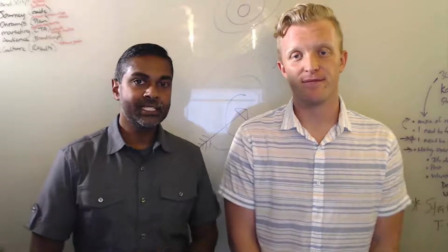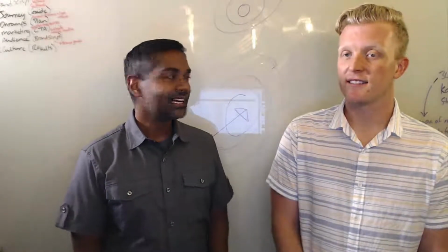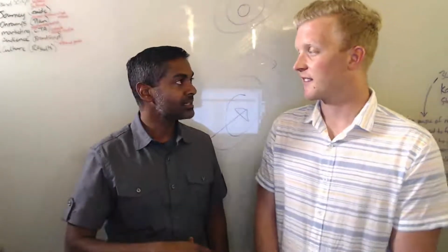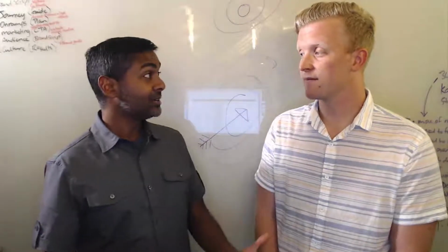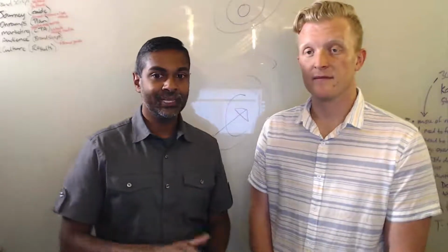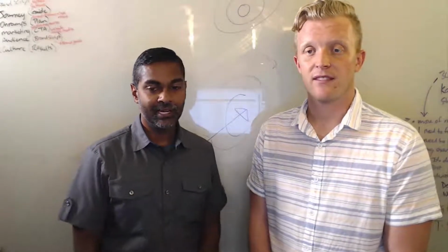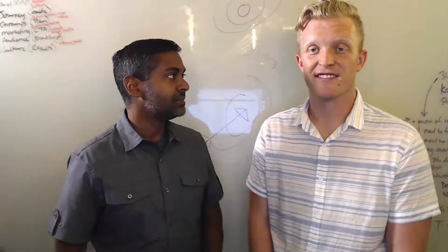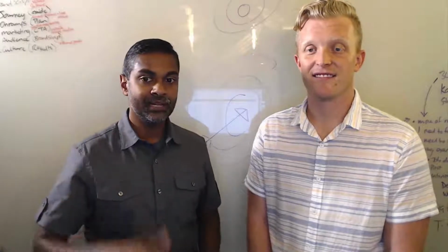So here's a great tip. About 48 hours after the event, have an evaluation. Just sit down with the team and evaluate. Go through that punch list, those questions that we talked about originally, and revisit those. Was the win achieved? Did everything go as planned? What didn't go as planned? How do we follow up with the attendees? Make sure that's a great win for you guys. And then create any notes for next time, so that next year when the event comes around, you've got a great list of things to keep in mind.